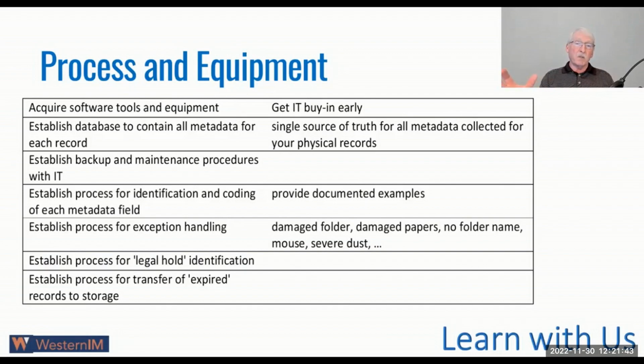You need a database that you can put all this information in, depending on the tool you acquire to do the job and the size of the project. Again, for smaller ones, a spreadsheet probably works fine. For bigger ones, you need tools. Establish backup and maintenance procedures with IT, so that all the work you're doing is getting backed up somewhere in the main system.